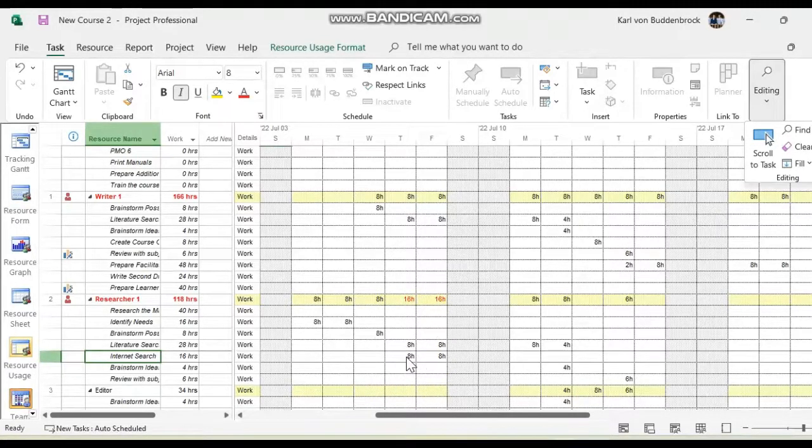So we've got to use one of our 5 methods to sort this problem out. Remember, 2 days ago we discussed the 5 methods. Remember Sander recommended changing the time schedule, I think it was, or increasing the resources. And then one of you, I think it was Sika, I'm not too sure, recommended just adding another resource. But we could also force this person to work overtime. So he works, but there are legal issues around that. 8 hours in the day, 8 hours at night. But look, the 16 hours is in red. That's where the problem is.